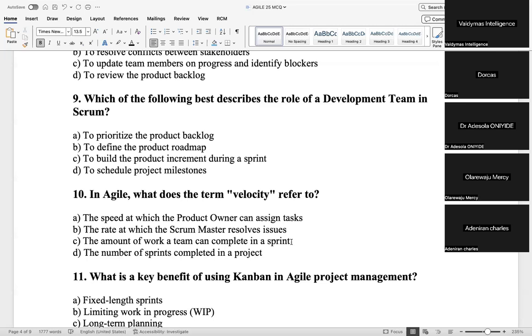So that dropped our velocity. And the 2 of them they removed, I think they were in QA. So that first reduced the rate that we were able to do QA. And our QA used to be like 2 days. But now because there's only 1 or 2 persons doing QA for us, they have to take longer days. And as long as you don't get a QA sign off, you can't say you have completed the development. So that's one. You now got the reason why morale is low.